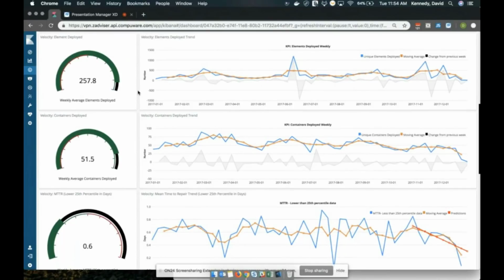So every quarter we're going out, and because many teams work together to create a new enhancement or new feature, there's a lot of elements that come together at one time. Though they're being tested individually, what we would consider production would be closer to the quarter. When I look at the top graph and see a big anomaly where we have over 1,000 elements deployed at one time, that causes me concern as to why I would be introducing so much change.